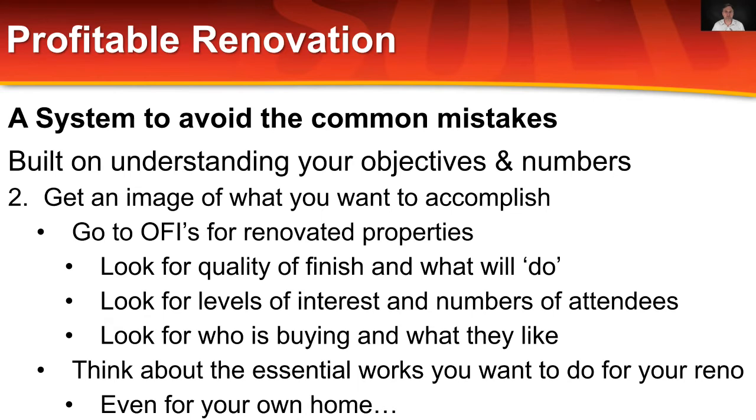And the point of interest here is you need to not produce perfect. This is the whole idea of the renovation for the purpose of making a sale: it is not to produce perfect, unless perfect is desired and a price of perfect exists in that market. So if you're going to renovated properties and the renovated properties are nicely presented, honest houses by people who have lived there, you know that presenting the Taj Mahal finish is going to be over-capitalising. People there don't want that.